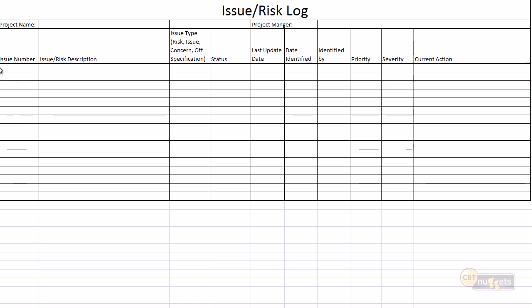My recommendation is we always create an issue or a risk number, simply because the issue and risk description will typically get long, and therefore copying and pasting the issue and risk name forward every time we're trying to report on it gets tedious. And yes, it requires people to remember that risk 15 is team learning curve and issue 94 is overall system performance.